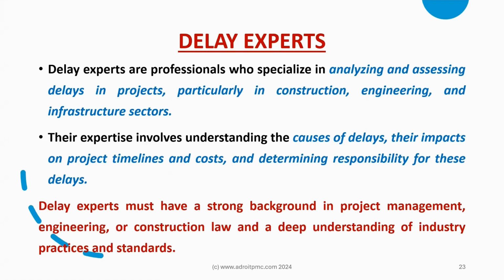Then delay experts. You could have come across this term. Delay experts are professionals who specialize in analyzing and assessing delays in construction projects, infrastructure projects, engineering projects, etc. Their expertise involves understanding the causes of delays, their impact on project completion timelines and cost, and determining the responsibility for the delays. They analyze all the factual matters and the necessary documents, and provide a report explaining the reason for delay and the party who is solely responsible for the delay in completion of the project.